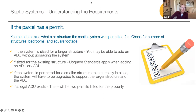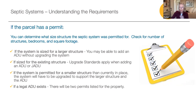If your septic system is permitted, the permit will tell you the size structure your system was permitted for. Look at the number of structures, bedrooms, and square footage. If the system is sized for a larger structure, you may be able to build an ADU without having to upgrade. If it was sized for the existing structure, upgrade standards apply when adding an ADU or junior unit. And if the system is permitted for a smaller structure, it will have to be upgraded to support the larger structure as well as the ADU.